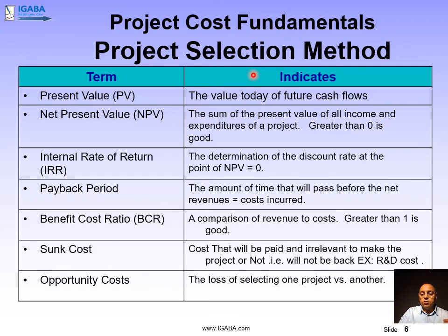If they tell you to discount at 30%, it means that they are making it challenging for you to show profitability. You will want to work on projects that earn a lot and earn fast, so that the amounts will not be greatly discounted, and you can show that the business case you're presenting is feasible.